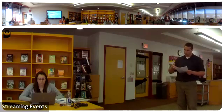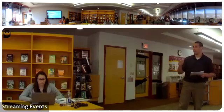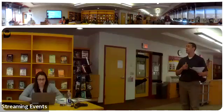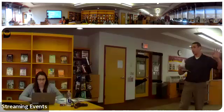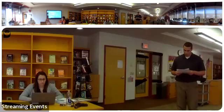The pool tile delivery, so we were originally told this was a 12-week lead, which is considerable, put it here in about July. We talked with the tile rep today, that's more like 8 to 10 weeks, so that's great news. Wall tile is only 2 weeks. And so in the locker rooms, we'll be ready to start putting some wall tile on, which is great.